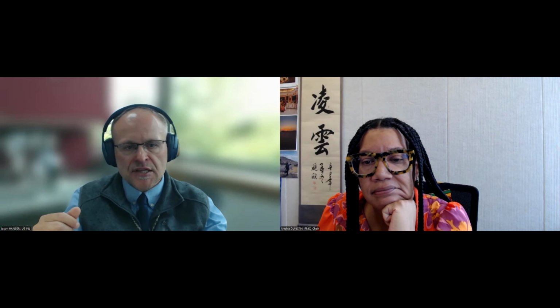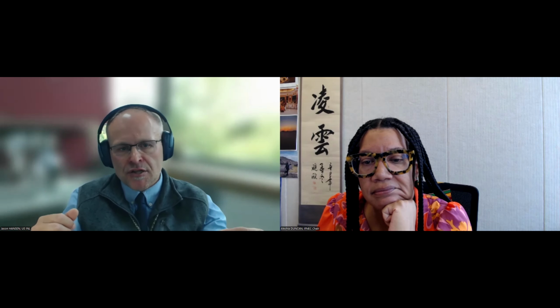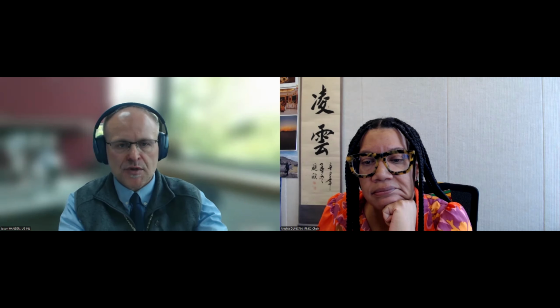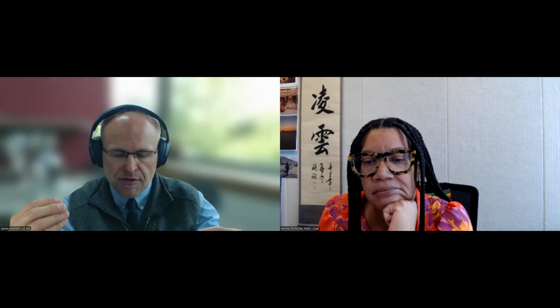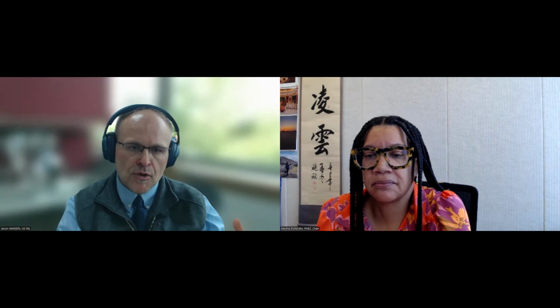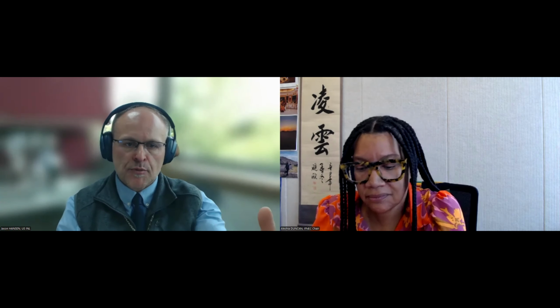And so on the first installation of that technology, you're going to learn things that on the second installation, you don't have to go through those same problems again because you learned about it on the first. And then when you build the third one, you've created opportunities for additional learning. So that's one thing that I think the Chinese are doing very well: they're taking advantage of those standardized designs and deploying them, repeat, repeat, repeat.